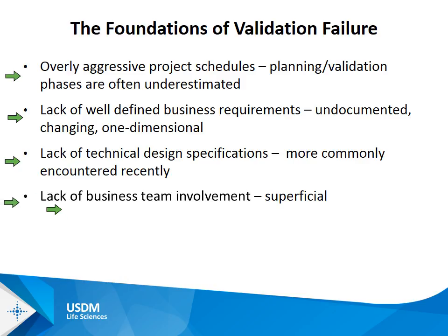And then, due to lack of governance, often there's a lack of business team involvement. Sometimes when you have validation efforts that are post-production or legacy systems, validation is a four-letter word to many people, and people would most rather avoid it. But these days, we need it more and more because of the complexity and the factors that are driving these problems. And business team involvement, the business owner involvement, not just in the system development and requirements, but the validation itself, is obviously critical to your success. If you don't have it, you have a lot of surprises at the end.